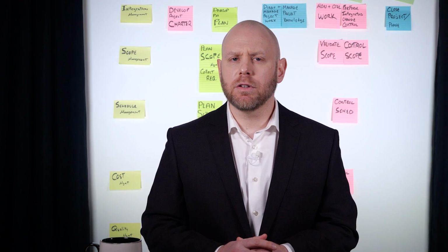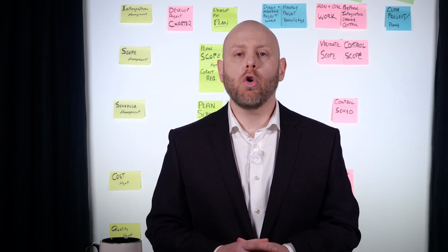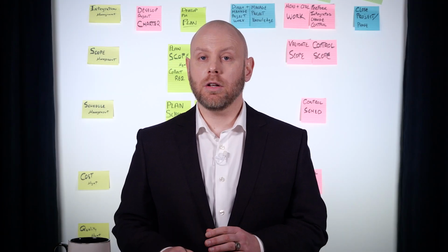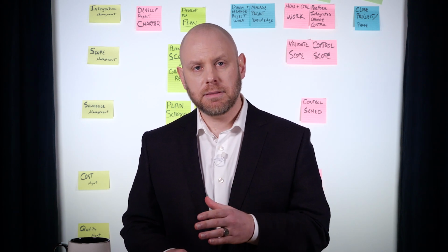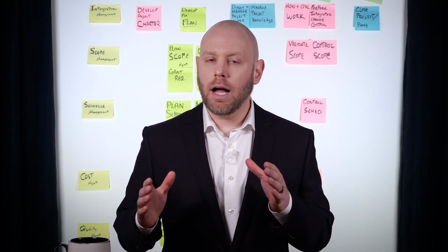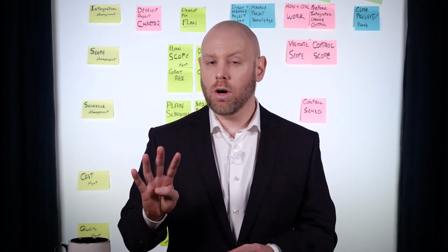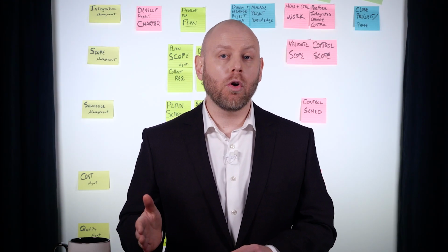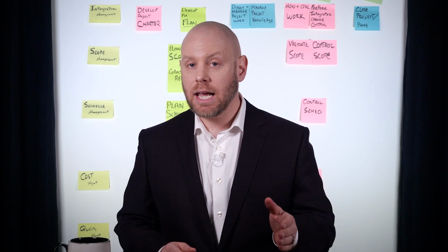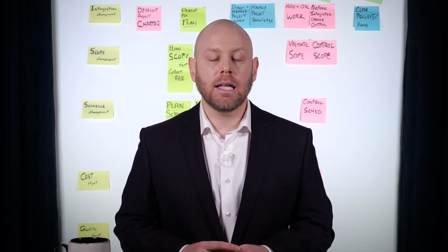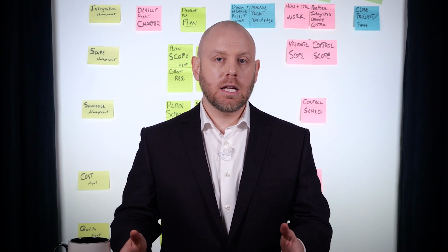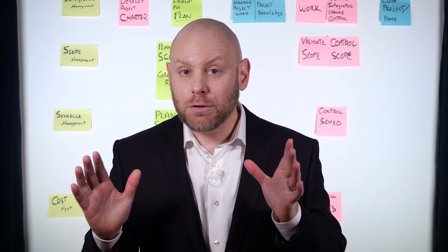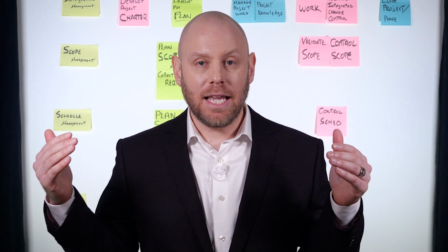A more sophisticated version of this is a PERT or program evaluation review technique. In this model, you still add the optimistic and pessimistic together, but you multiply the most likely scenario by 4. With a total of 6 data points now, 1 for optimistic and pessimistic, and 4 for the most likely, you then divide by 6 to get the accurate average. Good news, we're in the home stretch, so now all we have to do is put it together.